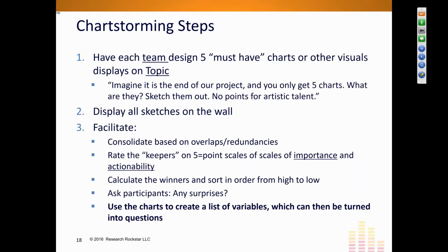So imagine you're running a kickoff meeting and you're coming to the brainstorming section. Unless it's a very small group of, say, 3 to 5 people, if I've got more than 5 people, I'm going to break them into teams. I usually like 3 or 4 people on a team, and each team is going to follow my instructions as follows. We're going to say to them, imagine it's the end of the project, we've come out of data collection, we've written a report, and you only get 5 charts. That's it, 5 charts. What are they? Sketch them out. No points for artistic talent.